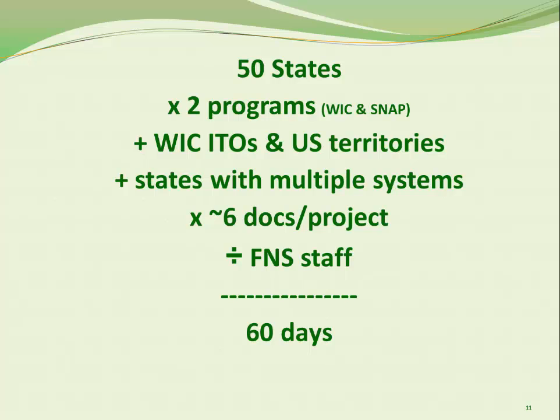Every state agency's project is important, and they are all on a schedule. It's safest to plan your project timeframe with adequate federal review time in mind, at least 60 days for each document. We are held accountable for that.